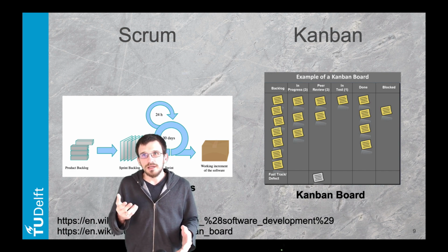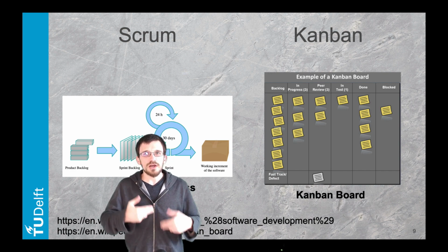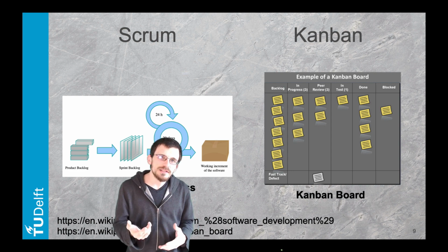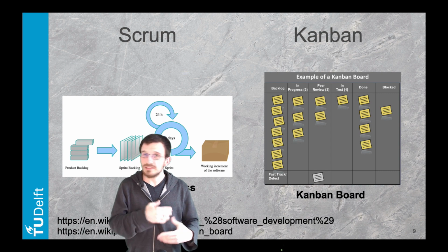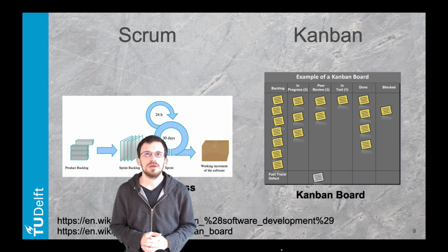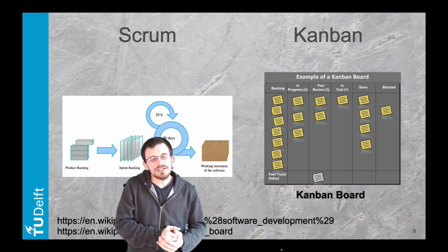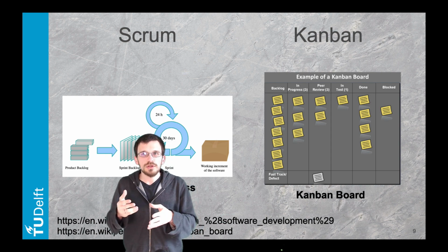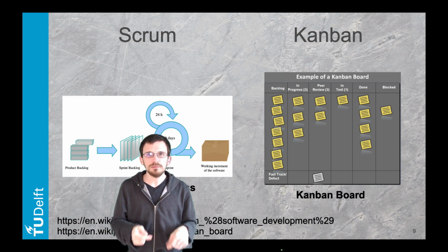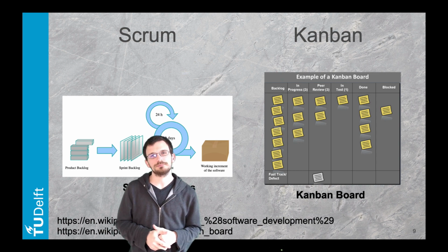As explained, the process involves discussing an update which the team can release as soon as they agree, leading to continuous delivery. With Kanban, the critical metric is the lead time, how long a task stays on the Kanban board up to completion.